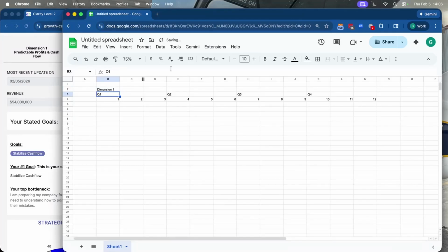Now, I have a very basic Excel spreadsheet set up here. If you imagine running 2 sprints per quarter, that would allow us what we recommend. That's 13 weeks in a quarter, 5 weeks per sprint, 3 weeks of catch up and what I call fudge time. What are those 3 weeks? Christmas, the 4th of July, Easter, Frank went on paternity leave, etc. Okay. We need to build in extra elasticity.